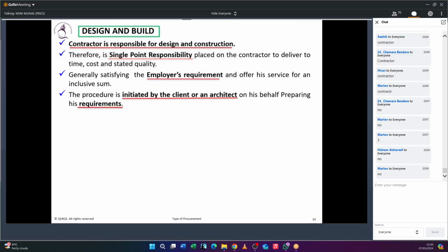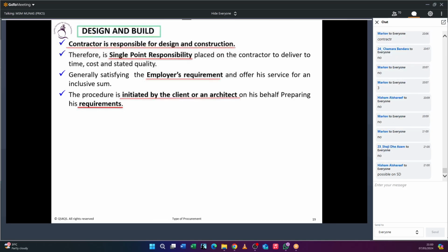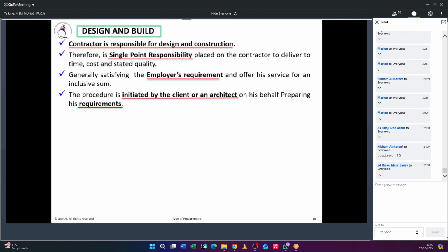No, we don't have the detailed design. Is it practicable? We can give a BOQ to the contractor, because every contractor, yes, you can give the BOQ. That is not a real BOQ because you don't have a scope of work defined. So the BOQ cannot be accurate. Whatever the quantity appearing in the BOQ is the accurate quantity during the tender time? It is not. It is an approximate quantity only.